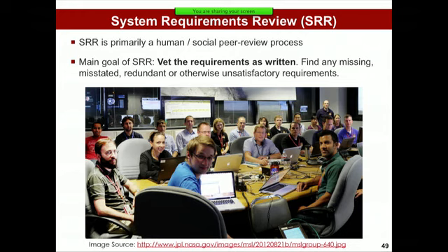So SRR, the idea is you've really been working on these requirements hard, as a team with your customers, and this is not a quick thing. This is not just 2 or 3 days. Typically, writing your level 0, level 1 requirements is a process that takes weeks, months, sometimes at least a year. But typically it's on the order of 3 to 6 months in many projects, roughly.